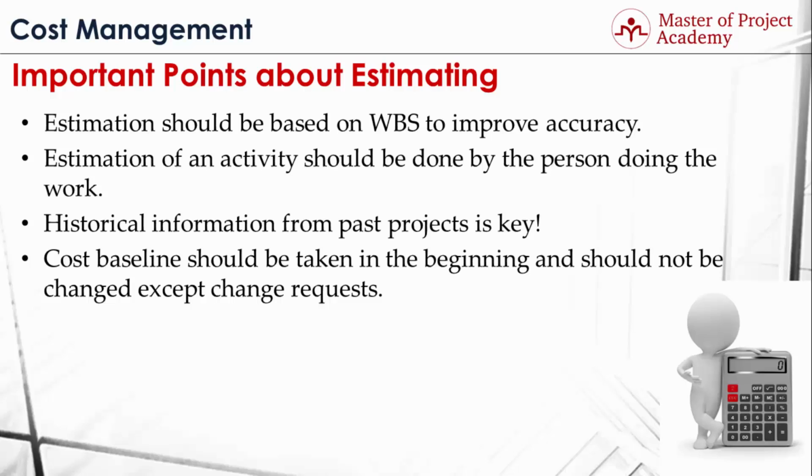Cost baseline should be taken in the beginning and should not be changed except by change requests. Because cost baseline of a project will show your initial project cost estimation for a project, and during the rest of the project, you need to meet these estimations to complete the project on budget. In order to measure cost performance of the project with the actual costs, you need to consider baseline values to check whether you are under budget or over budget. Therefore, as long as there is not a change request that will cause an increase in the project budget, cost baseline should not be changed in order to ensure healthy cost performance measurements.